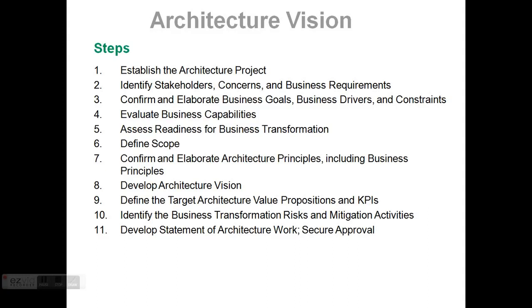The results of the readiness assessment should be added to the capability assessment document. These results are then used to shape the scope of the architecture, to identify activities required within the architectural project and to identify the risk areas to be addressed.